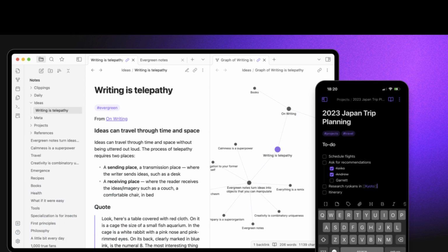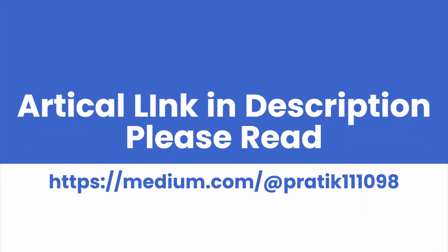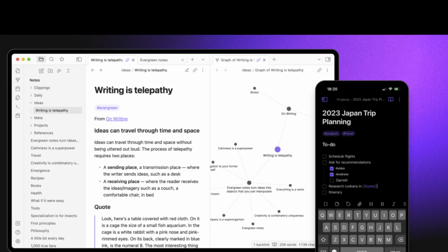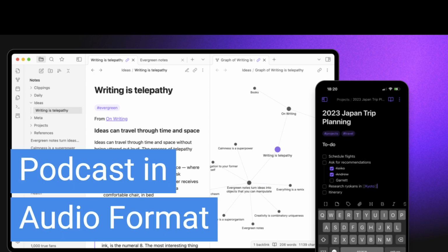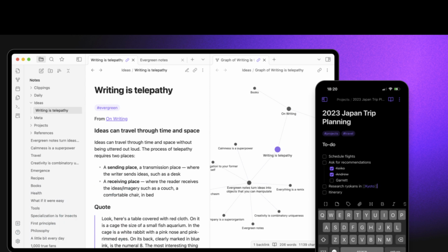I got it. So where does Obsidian come in? So our source material talks about using Obsidian to manage all the moving pieces of a sprint. And a great place to start is by setting up your workspace. Obsidian lets you create a custom folder structure. So for sprint planning, you could have a folder for each sprint, like sprint 1, sprint 2, and so on. Then folders for tasks, user stories. Maybe a backlog folder for tasks that aren't assigned to a specific sprint. It's like creating a digital filing system for your project. So far, so good.